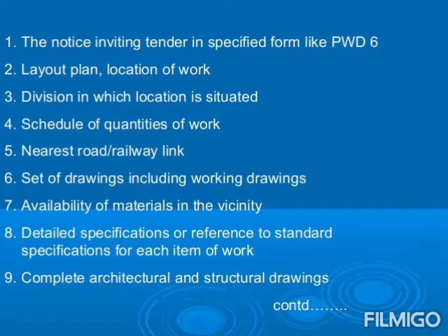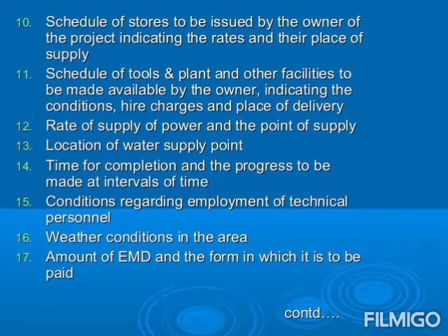Number 10. Schedule of stores to be issued by the owner of the project, indicating the rates and their place of supply. Number 11. Schedule of tools and plant and other facilities to be made available by the owner, indicating the conditions, hire charges and place of delivery. Number 12. Rate of supply of power and the point of supply. Number 13. Location of water supply point.